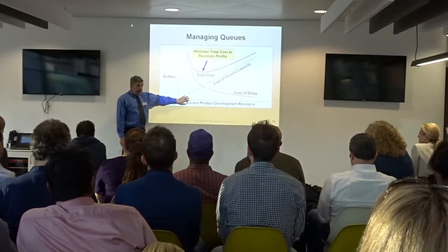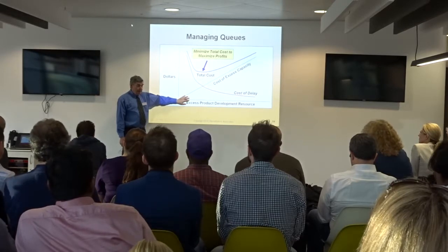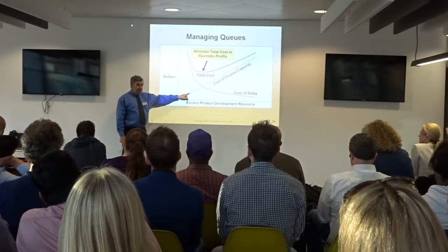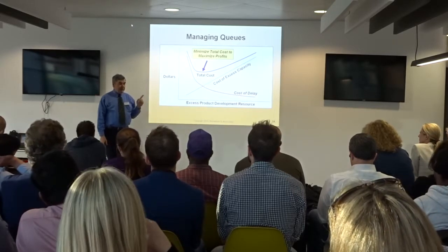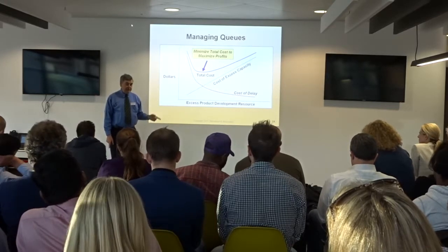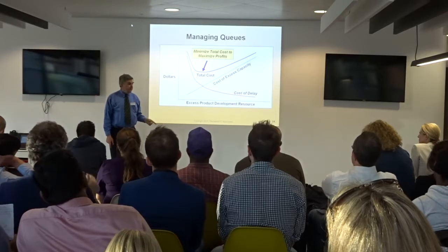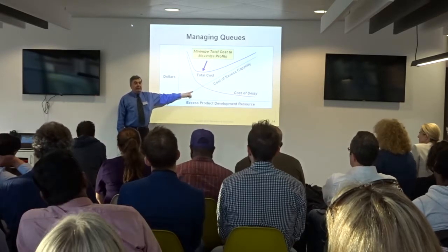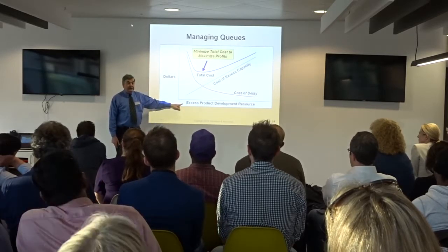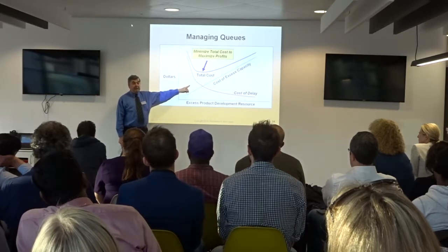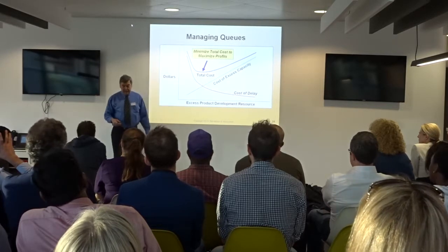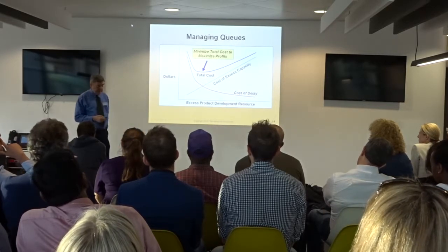but when you try to optimize a system, you do not locally optimize only one form of waste. There are two forms of waste in this process. One is the engineer being idle part of the time. The other is the work product being stationary, waiting to access a resource. And what this graph is telling you is when you have very low waste on the busy engineer side, you've got massive waste on the part of your product waiting in line, trying to get through the system. And that's what we're trying to fight with some of these things.